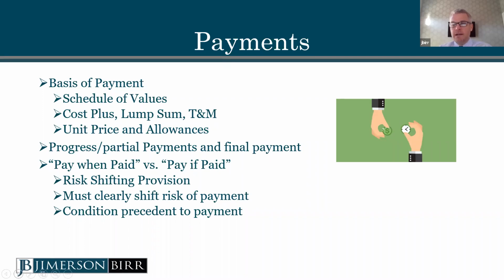Also, be cognizant of contingent payment provisions in your contracts. Those are known as pay when paid or pay if paid provisions. And for those of you who don't know, those are risk shifting provisions that basically say, I don't have to pay you unless the person who's supposed to pay me pays me. And that can leave you twisted in the wind a little bit. So you want to be paying attention to that to make sure, if you can, to avoid it. If you're the party downstream, you want to try to avoid a pay if paid provision. You want to get paid for your work within a certain period of time of when you do it.